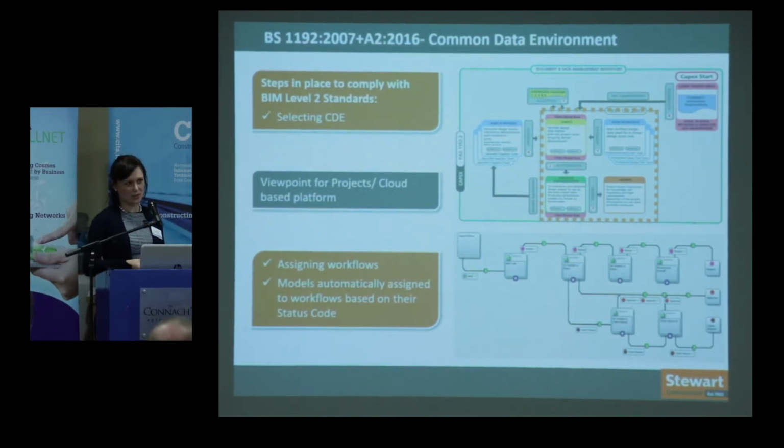So at the moment, if you upload the models which are, let's say, S1, suitable for coordination, shared workflow would be automatically assigned. So in all of those workflows, you have the number of quality checks which needs to be in place on level 2 projects. And the 4 sections of CDE, you have this work in progress, shared, published and archived. We would be controlling this by using the filters rather than creating the containers or folders.